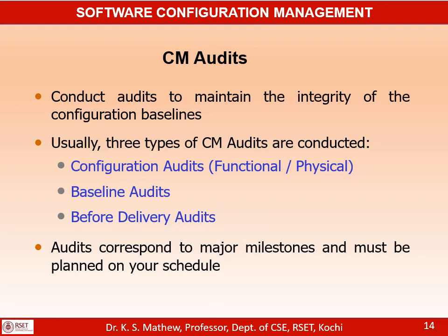And there is another important audit, the before delivery audit. Before a release, before delivery audits can be performed to ensure that the build or the release you are going to make is consistent, and while building the release they have taken all the correct versions of the files to make that build. All this will be verified during the before delivery audit. This is normally done just before the release. And the audit has to be planned and scheduled as part of your project schedule.